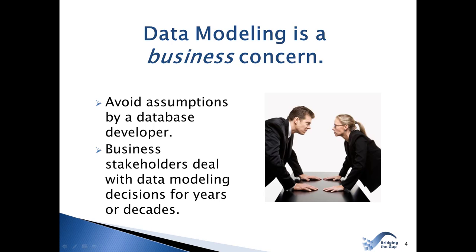Another example. After finalizing the database design, we learned that the database developer's decision to assign each item a unique identifier within the local store management system conflicts with industry standards, which base everything around a centrally managed identifier. The design needs to be updated to accommodate this new identifier and use it as a primary key for several tables.